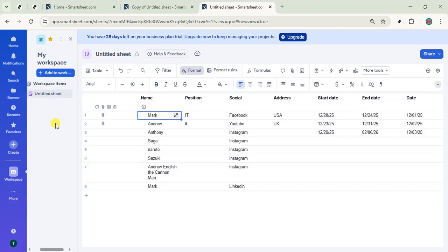Now, open your sheet. This is the grid or project plan that holds your tasks. Timeline view relies on the dates within your sheet, so the items that show up most clearly are usually those with start and end dates. If you use a typical project template, you'll already have columns for that. Don't worry if some rows don't appear later. Timeline focuses on rows with meaningful date ranges.